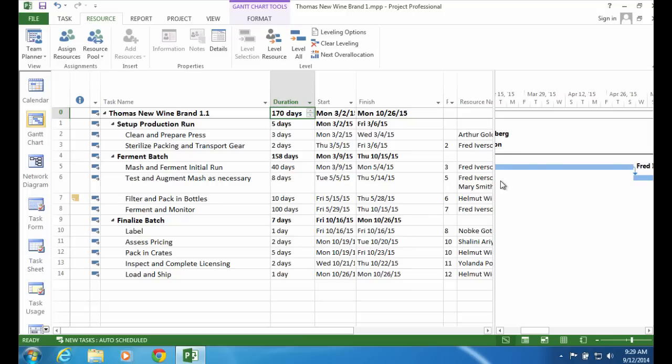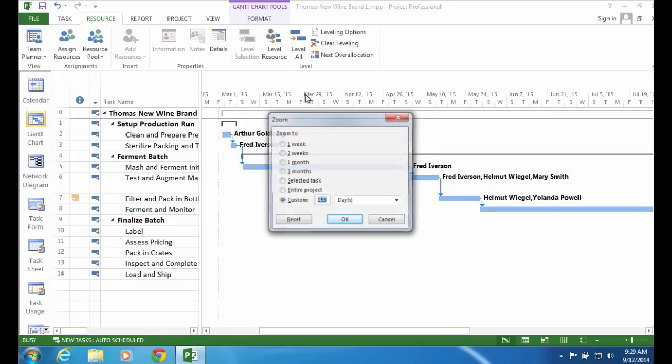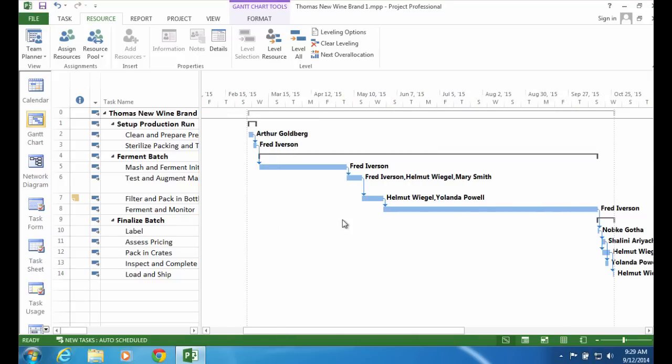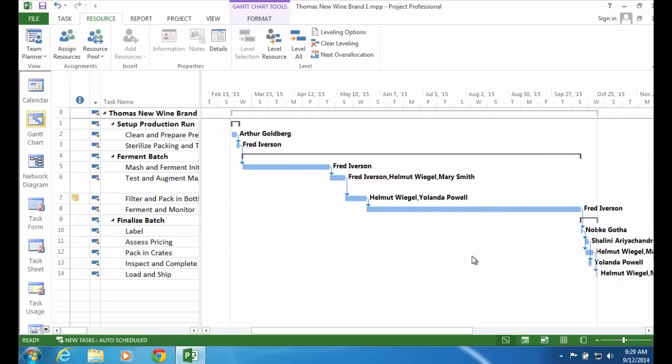But now we've finally fixed it so that all the predecessors are right, and let's have a look at what it looks like now. If I come across and pull it up, looks like we're okay. No orphans here. And it's possible in a project that you would have a piece that isn't sequentially interdependent. So what we've done is analyze task interdependence to check it at the end, found a couple of mistakes, and fixed them. And that's one of the more useful ways you can use Microsoft Project right off the bat to make sure things are done correctly. All right, that wraps up Exercise A.